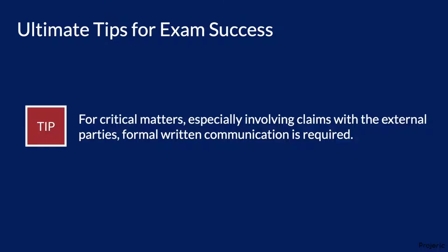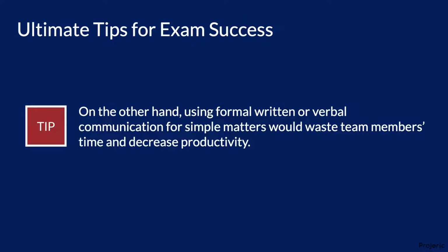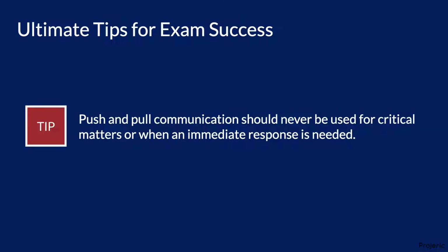For critical matters, especially involving claims with the external parties, formal written communication is required. For urgent matters that require immediate response, formal verbal communication can be a good alternative. On the other hand, using formal written or verbal communication for simple matters would waste team members' time and decrease productivity. Push and pull communication should never be used for critical matters or when an immediate response is needed.